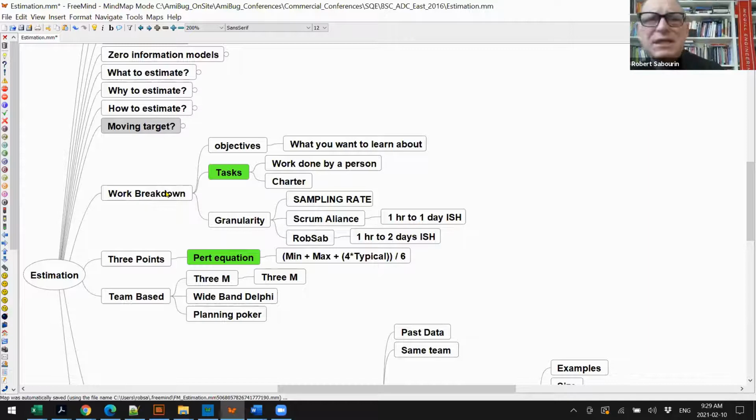I believe in a lot of different approaches, but the approach that I think is most beneficial for me is a work breakdown approach. I like to break a testing project down into elements of work, and I want to estimate those elements of work. So that's why I call this a simple, effective, experience-based test estimation. It's basically looking at the work that's being done.